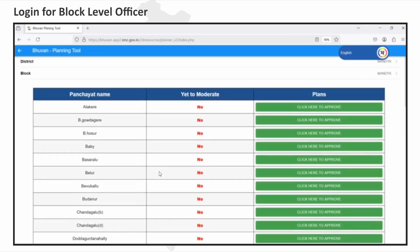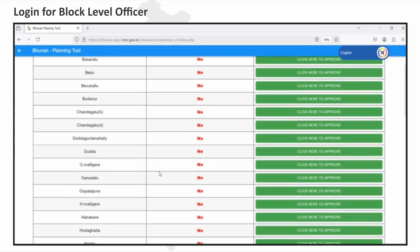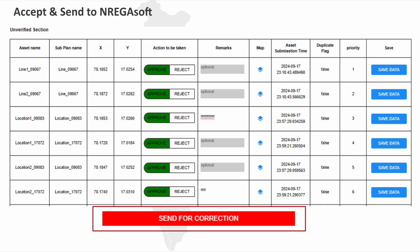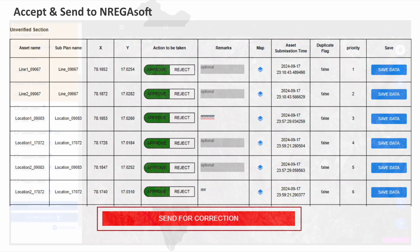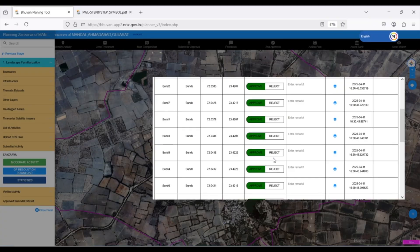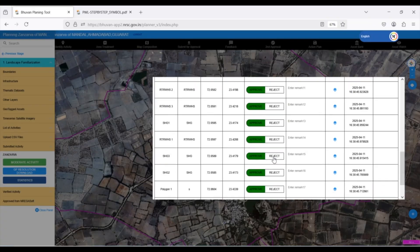The block-level officer can review, approve, or reject the proposed activities. Rejected activities are sent back to the GP user for correction.